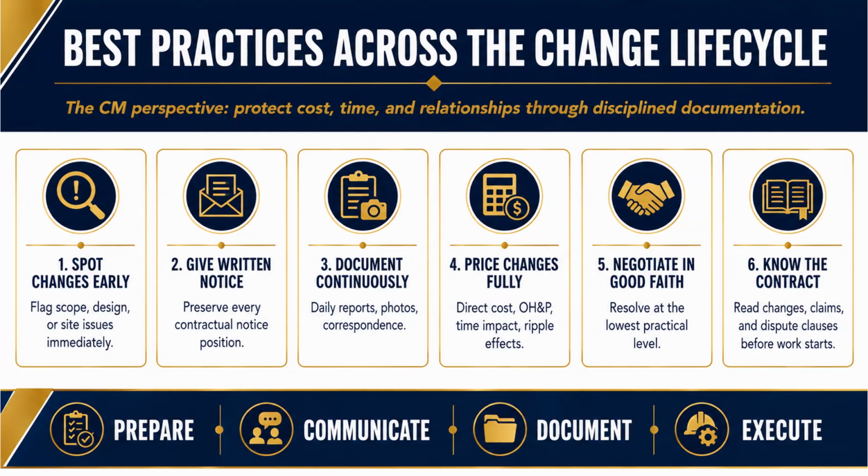1. Spot changes early. Flag scope, design, or site issues immediately. The earlier you catch it, the more options you have and the cheaper it is to handle. 2. Give written notice. Preserve every contractual notice position. Remember the notice deadline that can kill a valid claim. This habit is your protection against that.